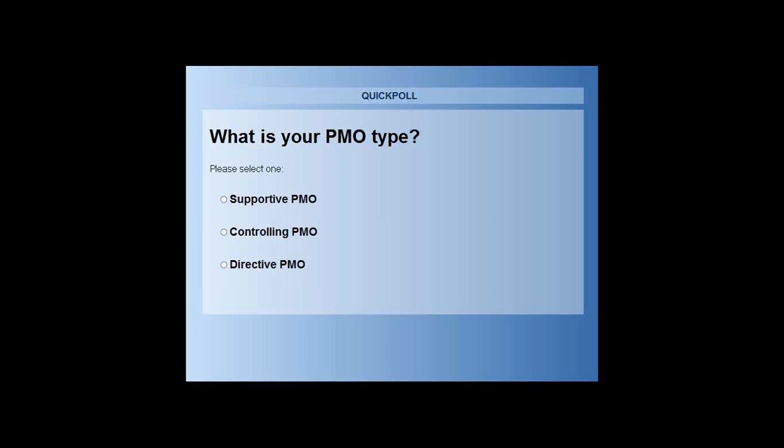Well, it's resource management. It is resource ownership. So that BAU activity is okay. Let me take a step back. In a functional organization, the challenge with a PPM tool, which is a project portfolio management tool, and a PMO initiative, with or without the tool. To implement a PMO in a functional organization, the number one challenge you need to address is resource assignment. People work on what they call BAU, or business as usual, and then the PMO is demanding, requesting, whatever you want to call it, those resources to work on initiatives, projects, and programs.